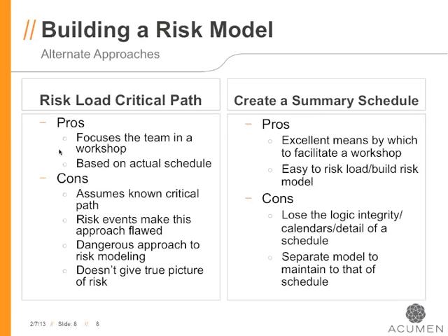Well, the massive drawback of this approach is that you're trying to manually approximate the very detailed logic in your 5,000 activity schedule up to the summary level. Well, you lose integrity. You can't build a summary schedule and represent the detailed logic in a 100 activity level schedule.